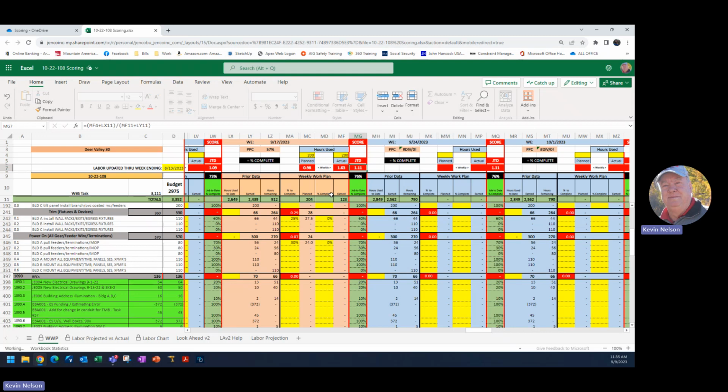So, you know, during the week, I think it's important that you're assessing your crew's productivity and seeking help from wherever you need to seek that help from, whether it's the field operations manager, conversations with your crew, constraints with the GCs. Perhaps you weren't able to install exits because the painter hadn't painted in this example. And that's what caused me to be unable to do that.